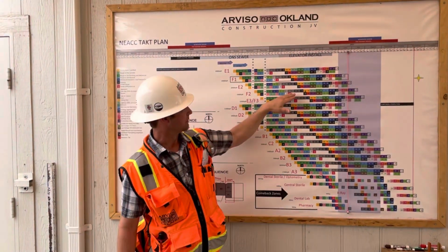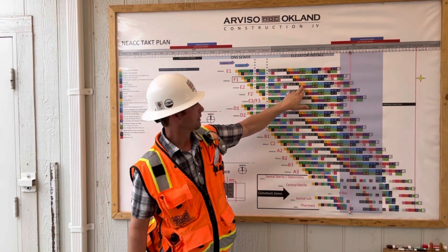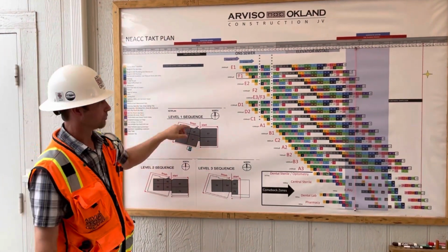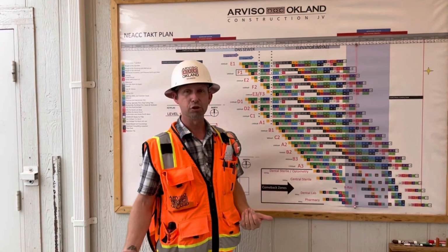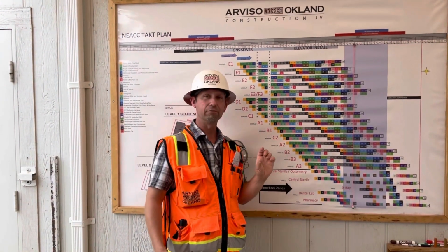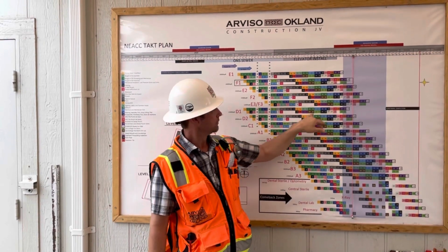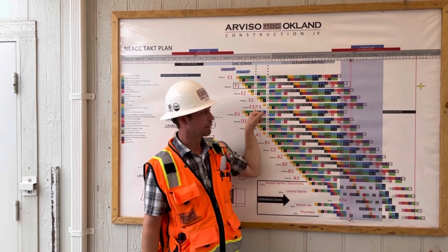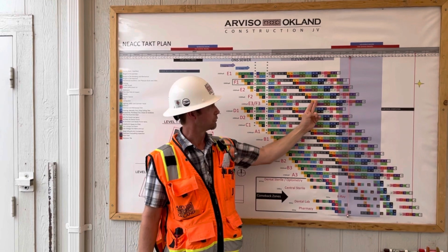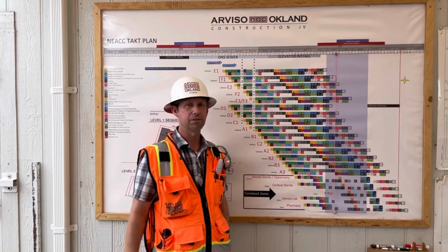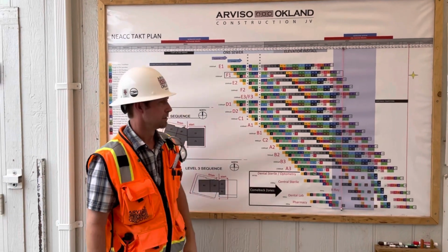So as you're coming through and you're given your blocks, like number 14, go to the legend, that's ceiling grid, right? So number 14 in the areas, I'm giving it 2 weeks. Each of these blocks is a five-day period, a single week by our calendar. So we're giving it a 2-week block. Well, in some areas you can combine those. You still have your 2-week block going through. You say we can land 2 areas at the same time in that same duration.